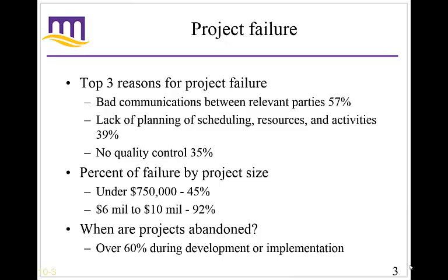So preferably, if there's a problem with a project, you can identify it early and fix it early. If you look at projects when they are abandoned, over 60% are during the development or implementation phase. Now that's after you've already spent a whole ton of money on it. Ideally, if there's a problem with a project, you identify it early and get out before you sink a whole bunch of money into it and then find out it's a waste.